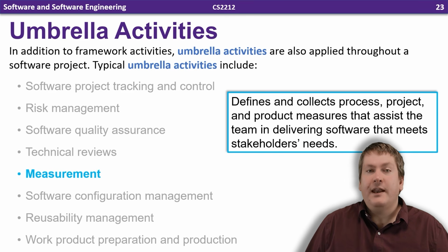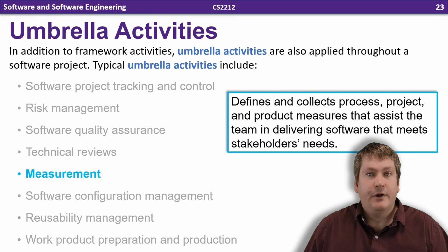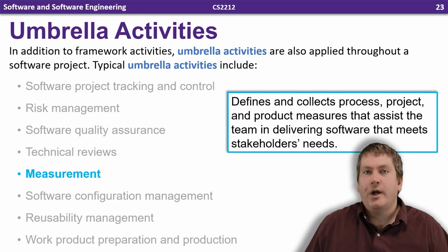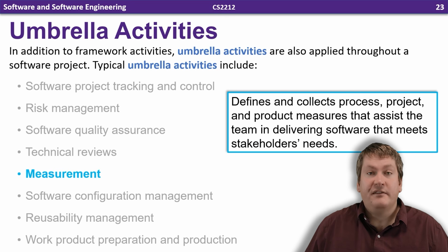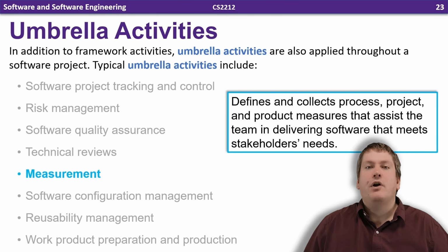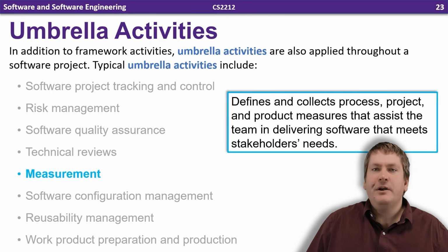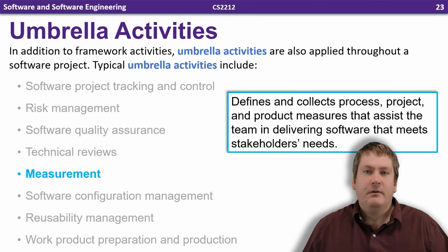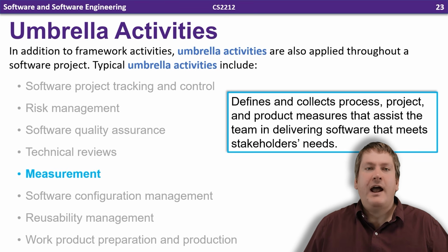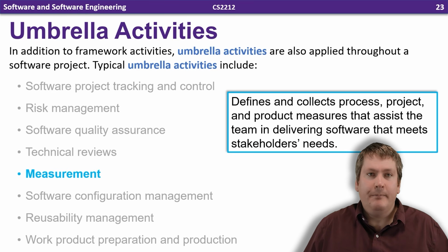While collecting these metrics can help to give insight into the project, it is important to understand what they mean and apply them appropriately. One example of an often misused software metric would be lines of code. So it's not uncommon to hear project managers using lines of code created as some sort of positive metric which might show progress towards completing the construction of the software. They may also use this to show productivity of certain employees. However, in reality, it's not really a measure of how much progress you're making or how productive your employees are. Rather, it's a metric of how complex your software is becoming.